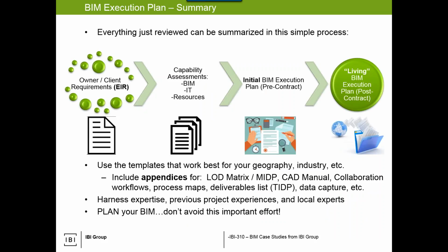And this diagram we brought up a couple sessions ago. This is fundamentally important for BIM. Oftentimes we jump to step 4 on this, make that BIM execution plan, and away we go. But nobody's asked the owner, are there any requirements, and nobody's assessed the skills of the consultants or the contractors or whoever is responsible for applying the BIM uses to achieve the BIM goals. Answer those questions, develop the BIM plan, and the project can move forward.